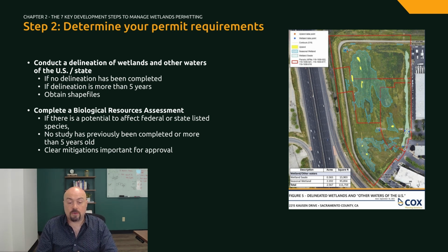If you need these reports for your project, make sure you obtain the shape files or CAD files of the wetland boundaries, as your engineering team will need them to complete their designs. Similarly, your permitting team will need to quantify these impacts.